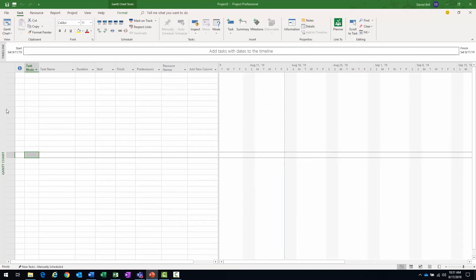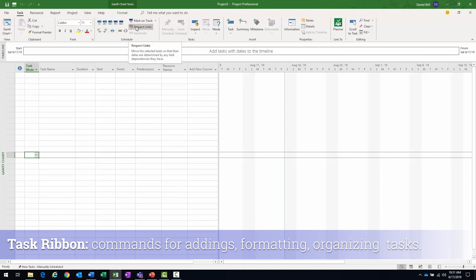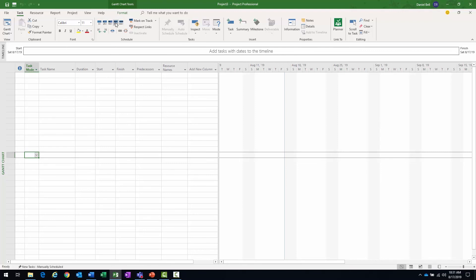Now, looking at some of the ribbons here, we have the task ribbon. And on the task ribbon, that's going to include all your commands for adding, formatting, organizing tasks, building your work breakdown structure. You can progress your tasks automatically here: 0, 25, 50, 75, 100. Create break dependencies, indent and outdent.